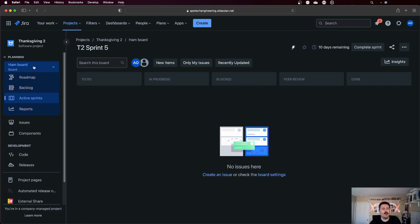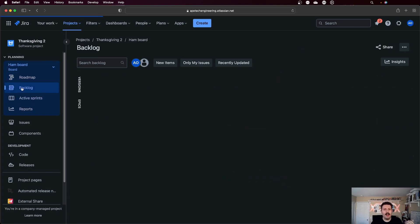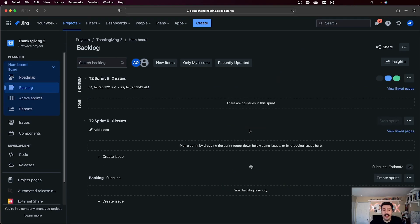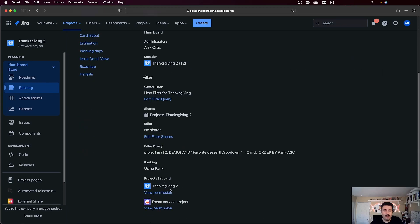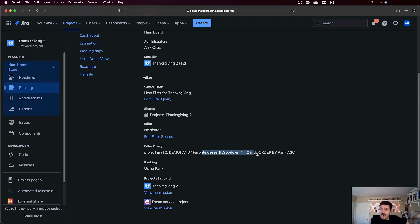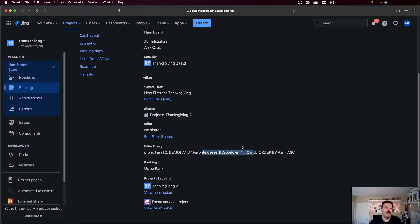So now when I go back to my ham board, a different board, and I go to the backlog, I should not see my tres leches because that filter criteria for this board, let me show this to you real quickly, is favorite dessert equals candy. Obviously my names aren't aligned, but the point is the other one had cake. This one has candy, but because we can only have one value, the issues are going to be piped to the right place.